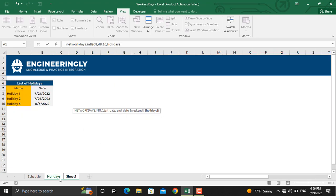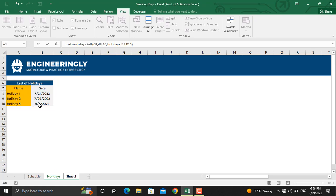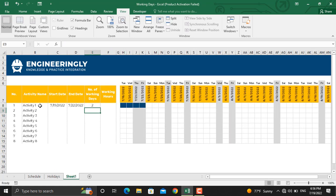For the holidays, I will select the values in these cells, and I'll close the parenthesis and press enter. So if I'm planning to start this activity on this day and finish it on this day, I have only two working days available to get the activity done.